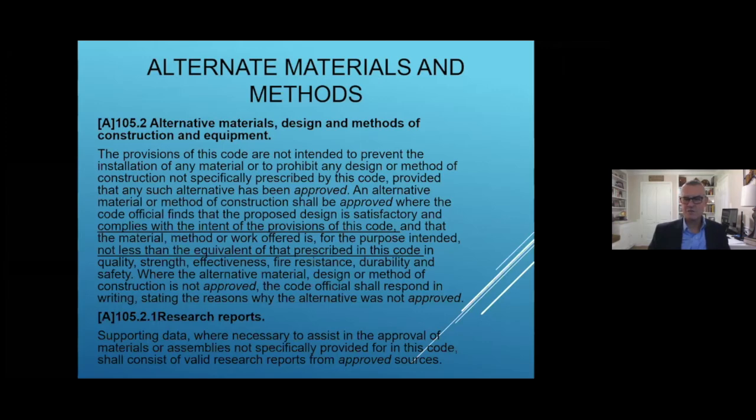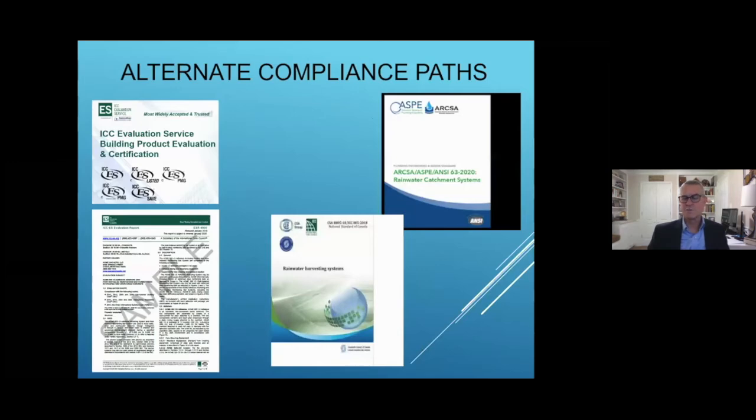Hopefully, in general, the system complies, and you just have to explain your way through some of these, like that skid plate, a prefabricated piece of equipment. That's a lot of stuff in one place. Maybe you have to break that down and go step by step through, as water would travel through it, exactly what each component does. Then you've certainly explained the intent of code compliance at that point. So you'd be getting an approval, and it'd be documented, and you'd have it on record that you got it approved, and here are the things you did that showed the compliance.